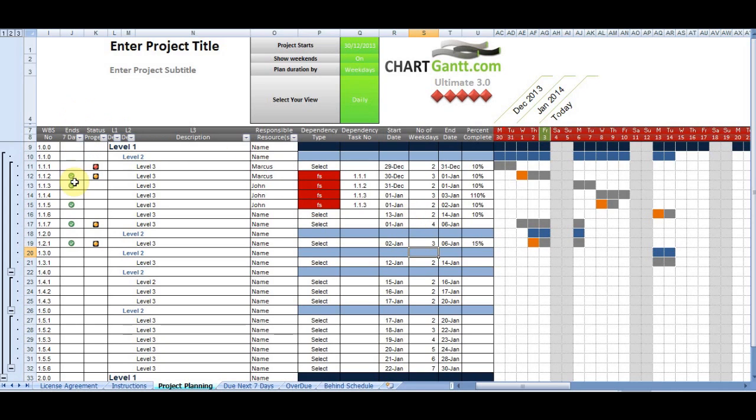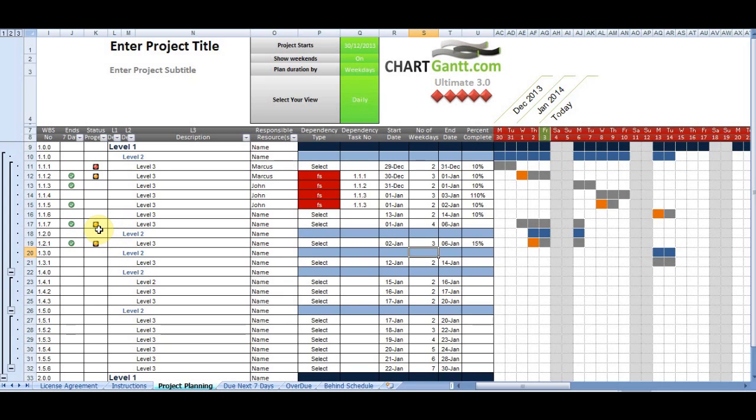The next column is a tick for tasks that are ending in the next seven days. They're just tasks that we need to be aware of and keep an eye on. And we have two status indicators here: a red light indicating a task that's overdue and an amber indicating a task that's running behind schedule. We'll have a chat about how that's calculated shortly.